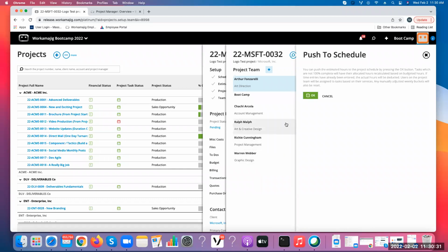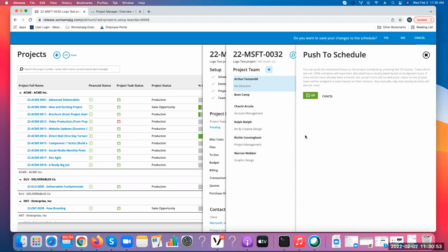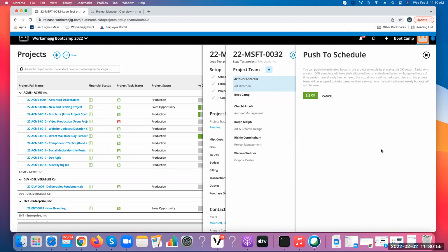And so usually we want you to have an estimate that matches the schedule, but for some reason, sometimes people can't or don't want to, but we wanted to give a warning here. So that's what this little grayed out paragraph is, a warning saying, hey, if you have something different in your estimate, we're going to look at your estimate. If you don't have an approved estimate or don't have an estimate at all, then we're going to look at whatever you've built here. So I'm going to hit OK because there's no estimate on this project yet.